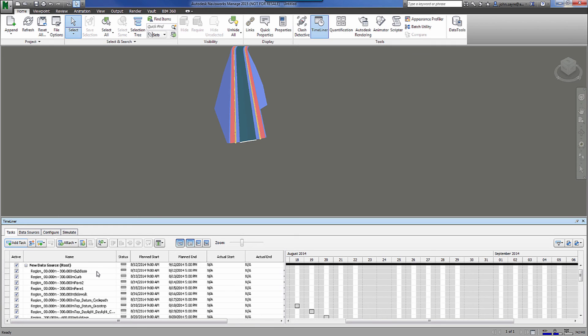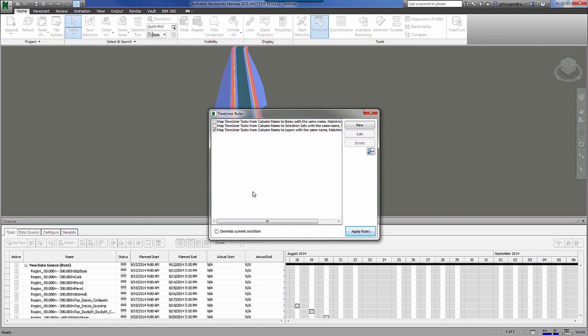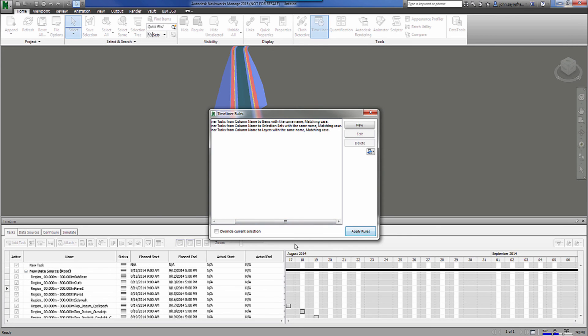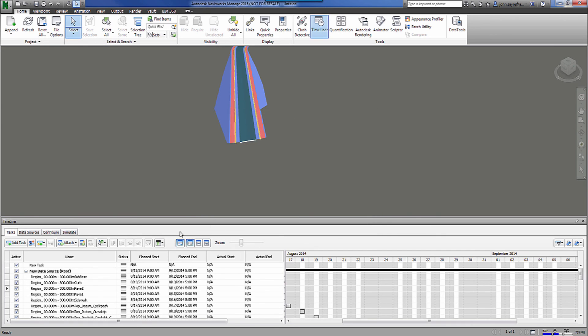Once that's in, we can select auto-attach using rules and make sure that the map to Timeliner from column name to layers with the same name matching the case. We'll apply this rule and it will automatically attach all of our information in our Gantt chart or our task tab to our 3D solids.